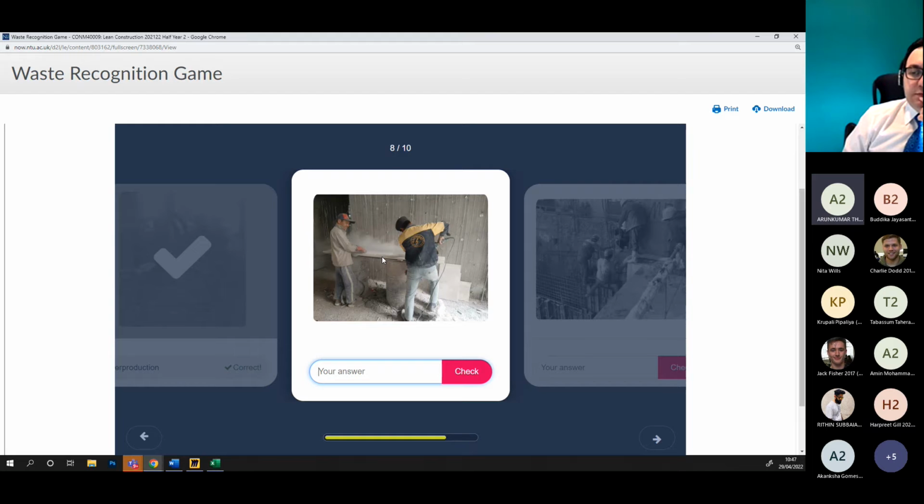No, defects means we are talking about defects in ordering the material, like the measurements. It doesn't work like this in this project. They just order, for example, each of these stones something between 120 centimeters and 2.8 meters. Then they bring everything to the site, cut it and then use it. But yes, it's better to order standard sizes, so you bring everything to the site and just incorporate it into the building. I got your point.